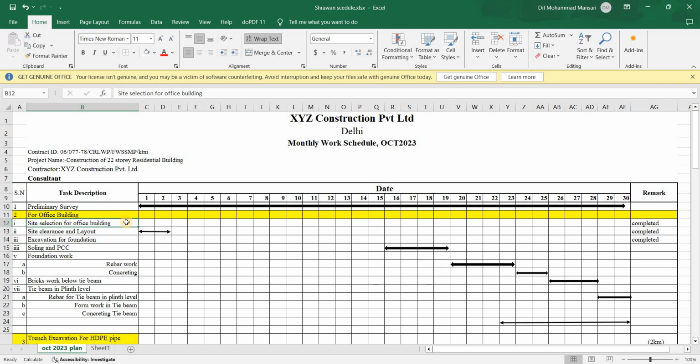site location. What happens most of the time is that you have the project, but site access is not done, or the site is not accessible because of some local authority or local pressure, and those people will be protesting against that location, because the locals would have no idea of what's going on. So at that time we have to fix the location with your consultant team, whoever the authorities authorized to solve such issues. So this would take, suppose, and you can write remarks.